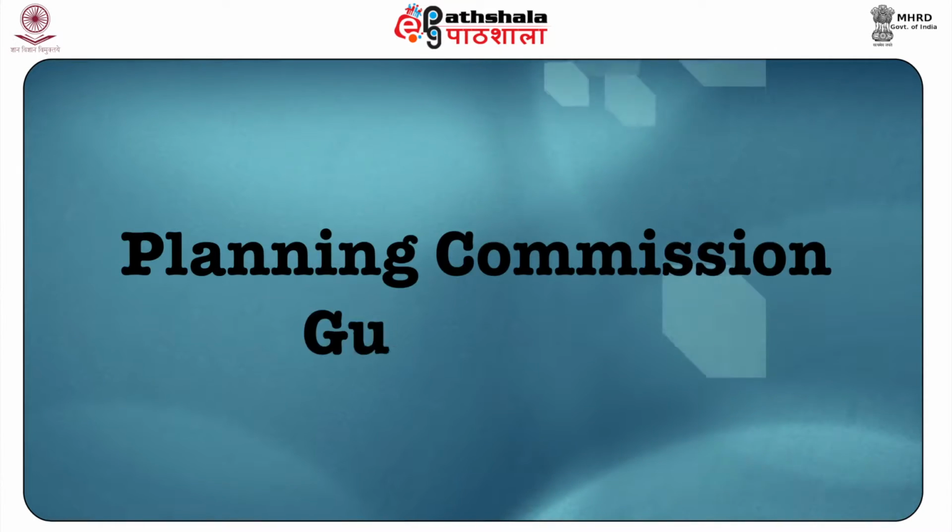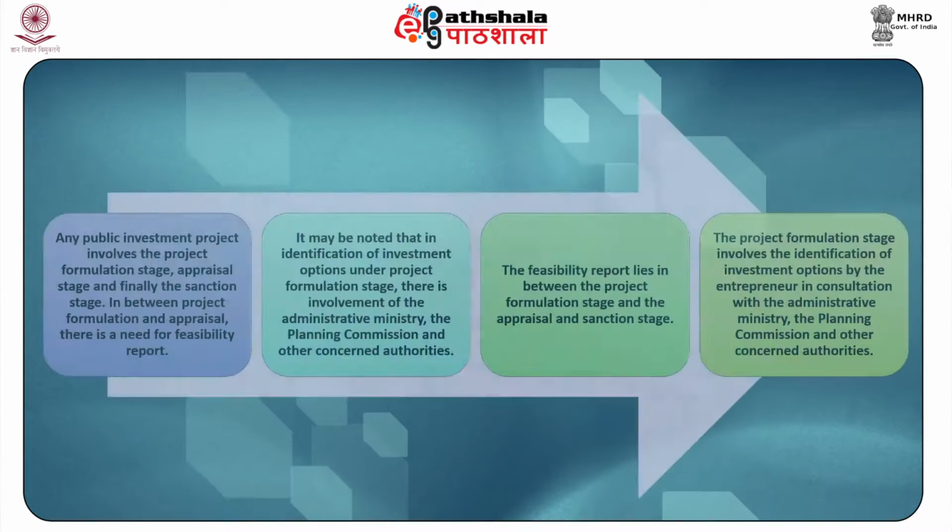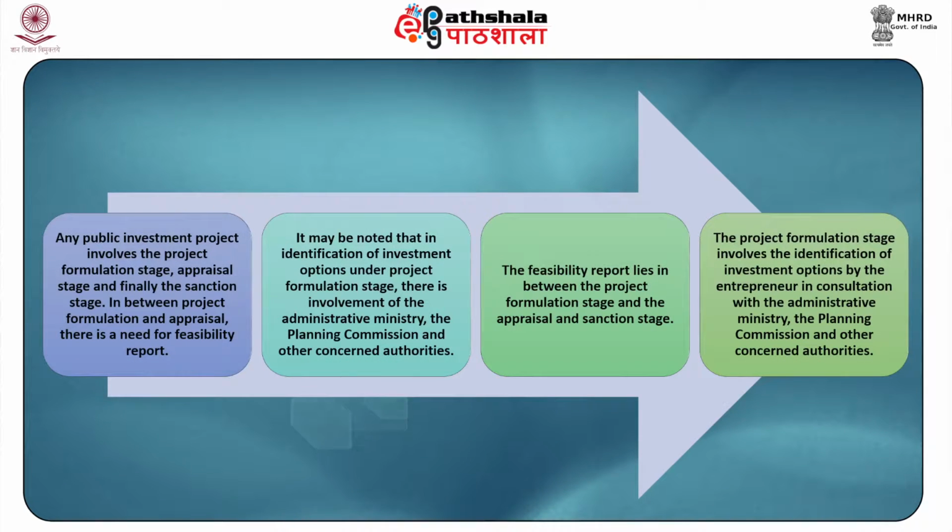Now coming to the Planning Commission guidelines. Any public investment project involves the project formulation stage, appraisal stage and finally the sanction stage. In between project formulation and appraisal, there is a need for a feasibility report. It may be noted that in identification of investment options under the project formulation stage, there is involvement of the administrative ministry, planning commission and other concerned authorities.